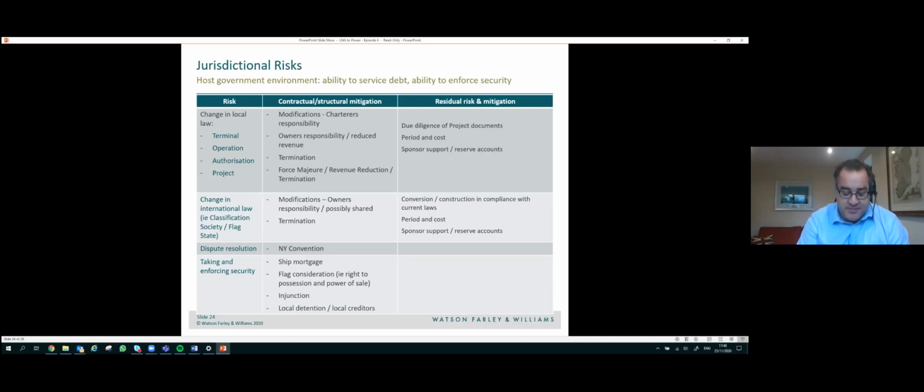Although the responsibility for any change in law relating to the operation of the FSRU will usually fall to the FSRU sponsor. That said, this is a very broad generalization, and it may well be the case that in any given jurisdiction, it is clear that a change in law or decree from a particular authority could have a wide-ranging impact on the project generally, requiring a particular provision within the Charter to address that scenario. It is also the case that a change in law may constitute an event of force majeure, with the subsequent rights of termination that this affords either or both of the parties.